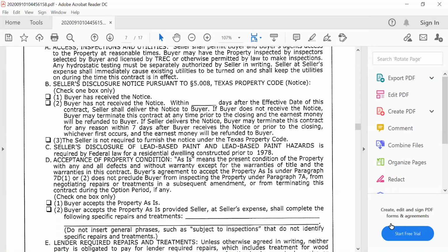So if you've got a buyer who's very aggressive, you're going to put a shorter time frame, warning your buyer that whatever time frame we have here doesn't make the seller do anything. The seller can still take their sweet time. And there's nothing the buyer can do except terminate the contract. So the number of days here is less important from a clear standpoint of technically what it does to the contract. It's more a negotiating point depending on which side you're on.